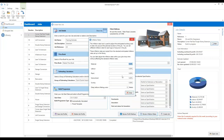You can also review your inflation rates for this particular job. Inflation is a really important thing to consider at the moment. Our sales and marketing director Joanne was saying that material inflation has been 20% in the last 12 months — she thinks it was July 2020 to July 2021. So if you're estimating work that's six, nine, twelve months ahead and you're not factoring in inflation, you're going to be carrying out work that you're not making any money on and potentially making a loss. Inflation is something that's essential to be thinking about.